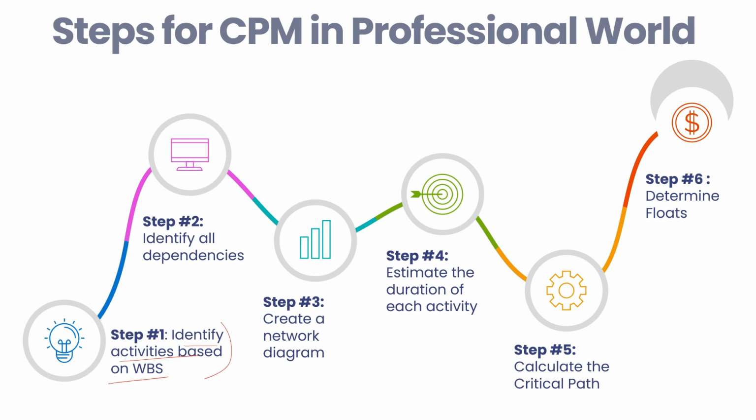And for those, you may need some subject matter experts, you may need to connect with various people, various functions, various organizations. It may depend upon the type of work and complexity, which will define how much effort is required to identify those activities. Then you need to group those activities in a certain WBS. Accordingly, you need to plan your cost and other things which will align with these activities.